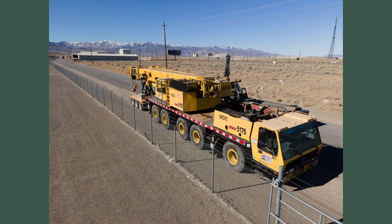We also had a very exciting delivery on site this week. The crane. So the crane is on site, which is exciting because it means that whenever the walls are ready, they'll be ready to start lifting them. So we actually may see some of the walls start going up while some of the remaining ones are curing.